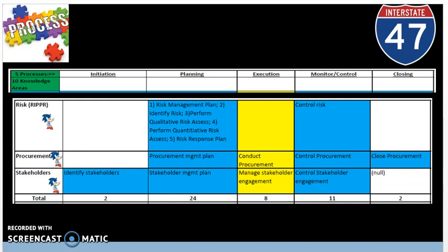We need to do make or buy analysis and market research. And the proposed outputs from this process are going to be the procurement management plan, updates, and make or buy decisions. This is the only planning process with change requests as an output because changes can occur in the procurement process to actually make or buy the decision. It is a process of documenting project procurement decisions, specifying the approach, and identifying the potential sellers.